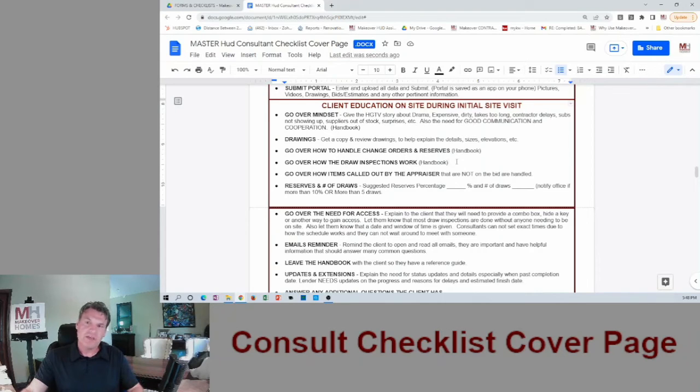We use our specifications of repair report, and we go through the job. We take all the pictures, and then we decide what amount of work is done, and then we fill out the dollar amounts. We'll train you on that, including using the spreadsheet that's in Drive that's already going to be pre-built for you, and how to come up with those numbers.